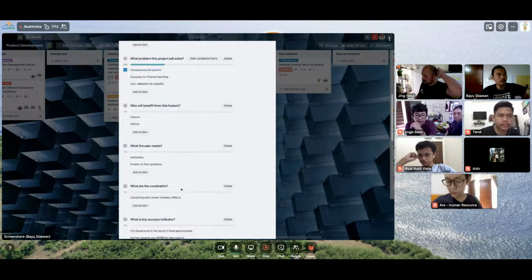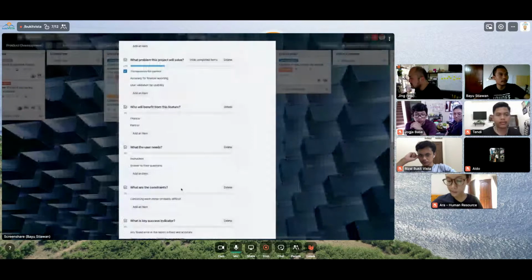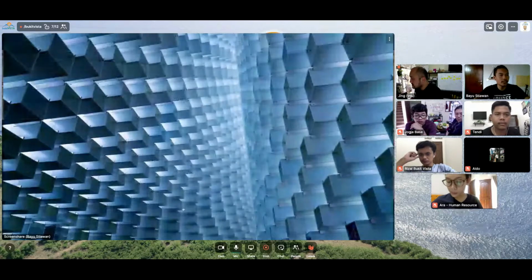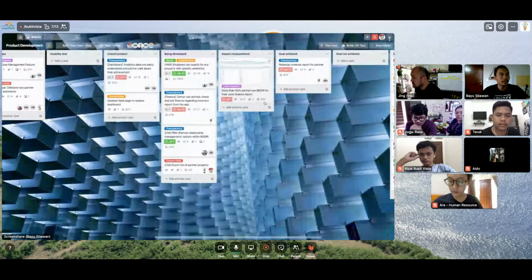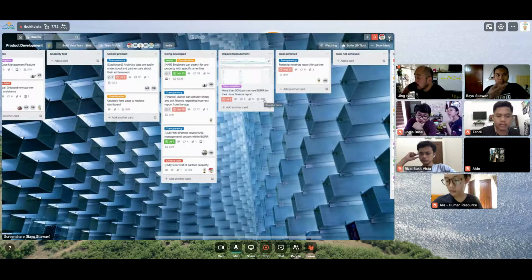If we see everything from this checklist, basically every question answered, we can see that it's 2 out of 13 questions that we finished. So it means it's not 100% impactful, because we can only check 2, right? That's how I know whether my project is successful or not. Excellent, excellent. I think that's really awesome.